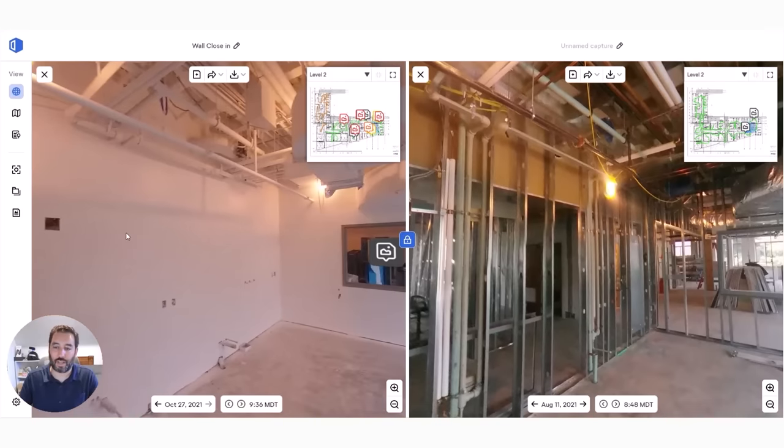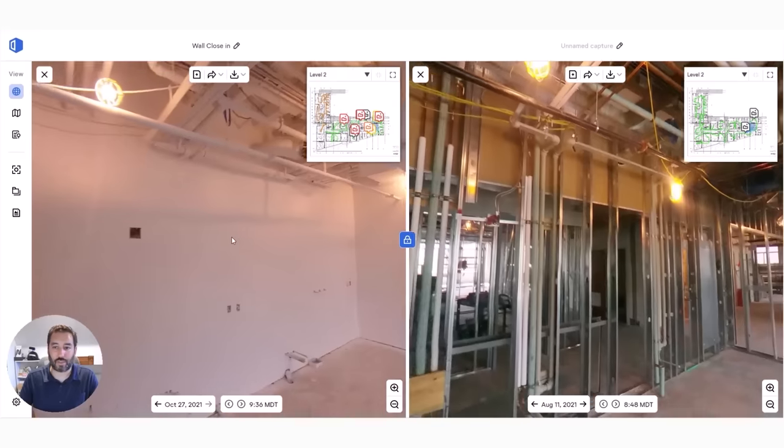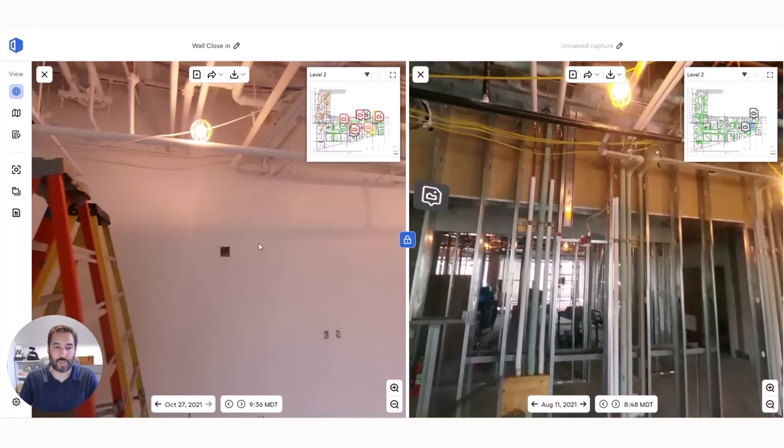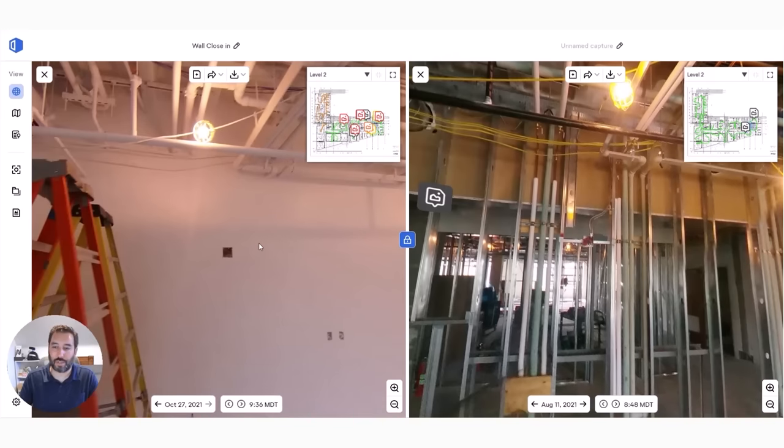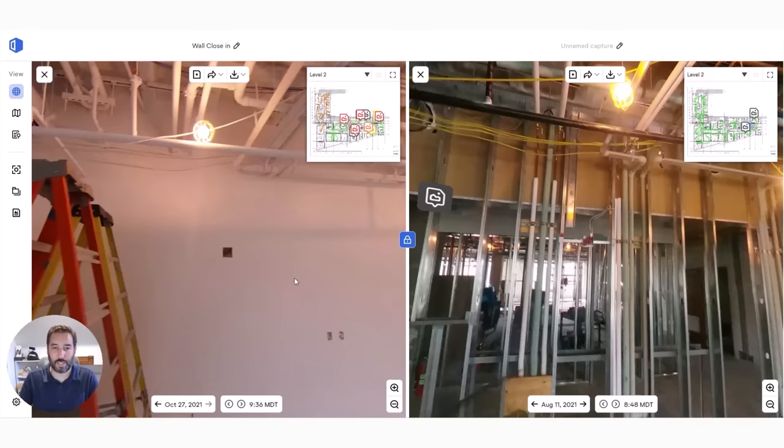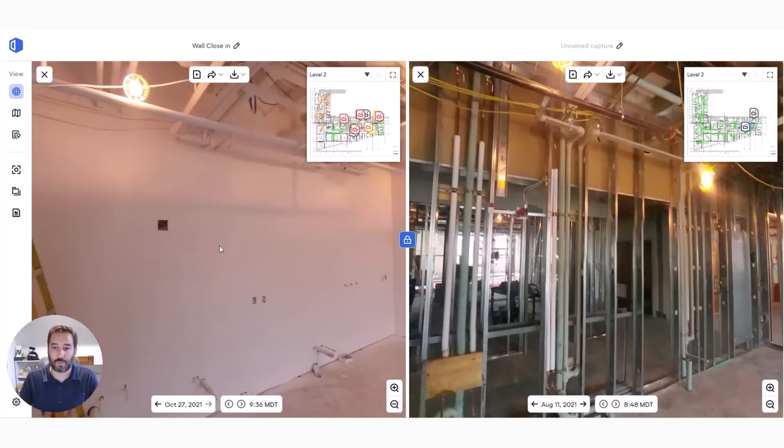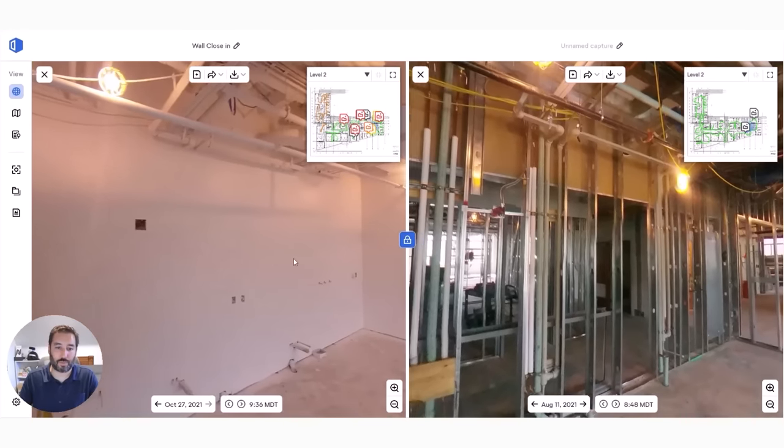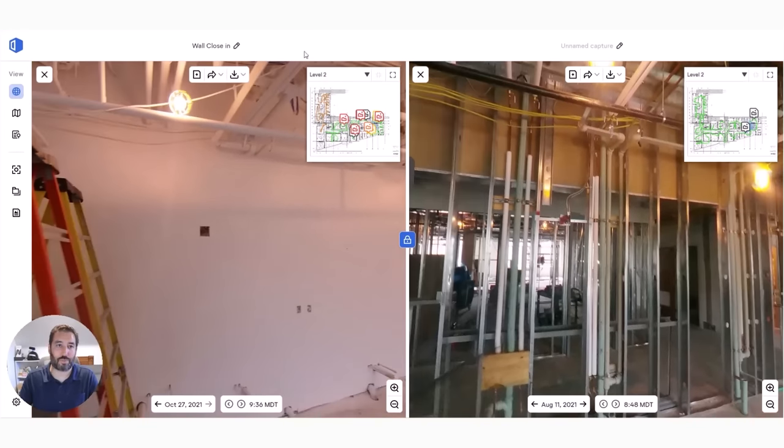if an inspection for fire stopping, if a location was missed, you can go back and prove that fire stopping was installed without having to open up the wall or open up the ceiling and take a peek. So this alone has become one of the more valuable tools within OpenSpace.